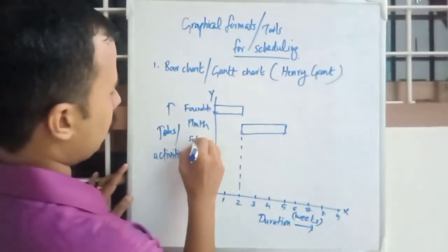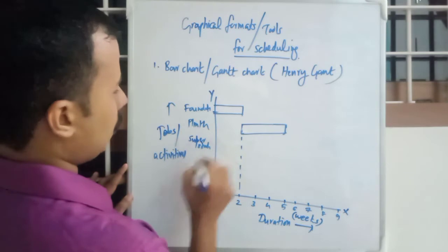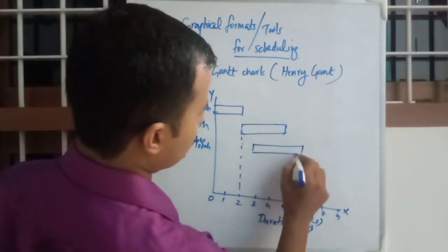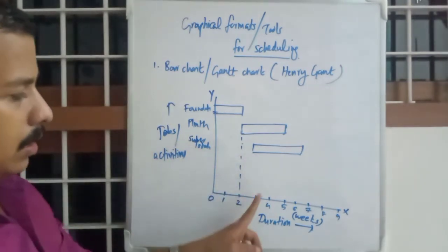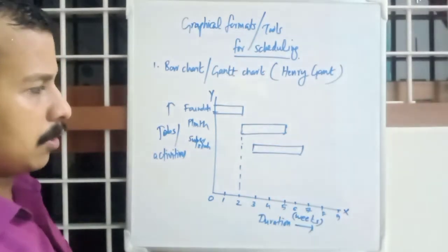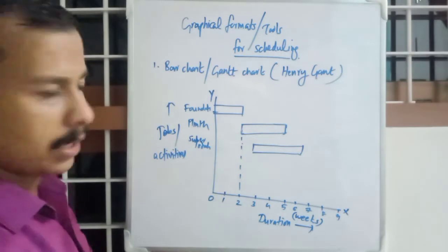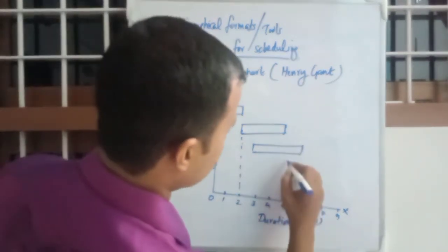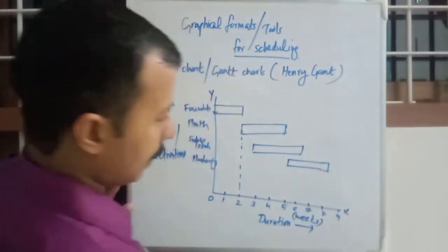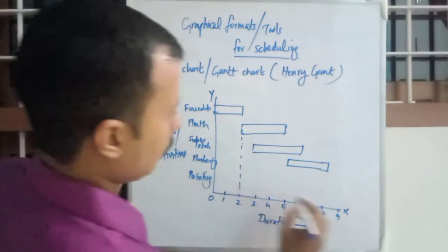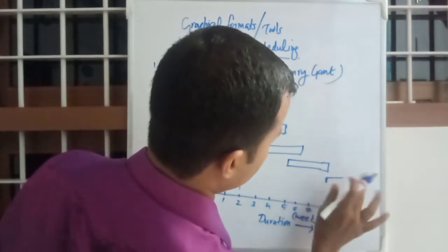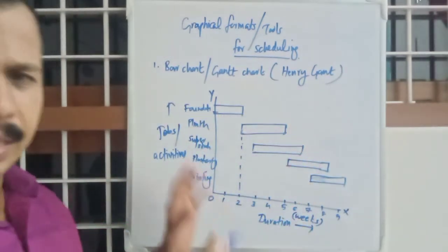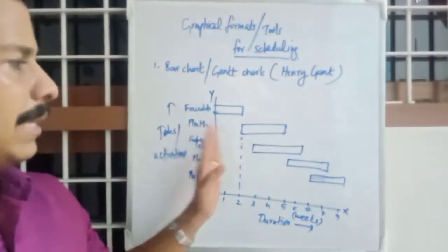Due to some peculiarity, you can construct the superstructure after 1 week of construction of plinth. So you can start superstructure construction at the third week, because a portion will be completed by 1 week of plinth. Then as the superstructure continues to build, plastering can be started around the 5th week to 8th week. Then painting will be 7th week to 9th week. So this is a very typical example, do not take it accurately, a very typical Gantt chart.